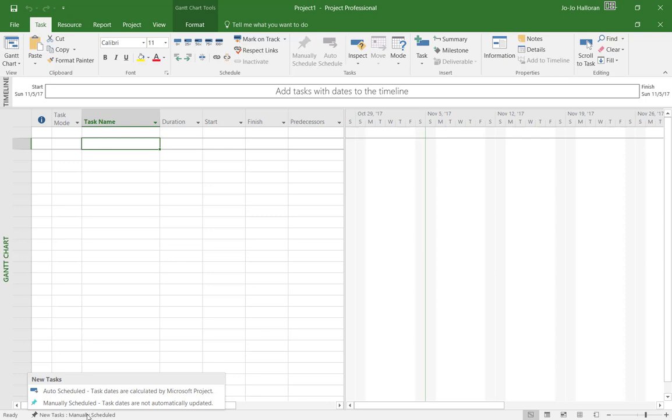So you can go ahead and click right down here on the manually scheduled, and you can change it to auto scheduled by just selecting it and clicking on it. And now all new tasks are auto scheduled.